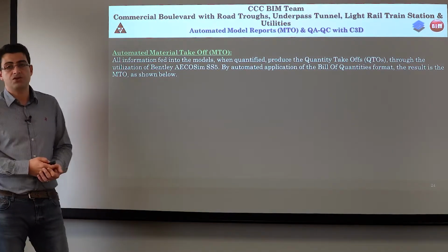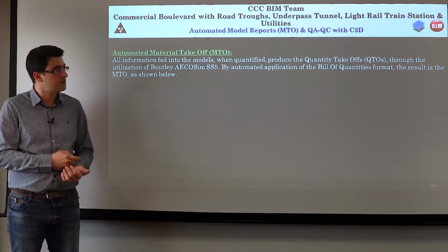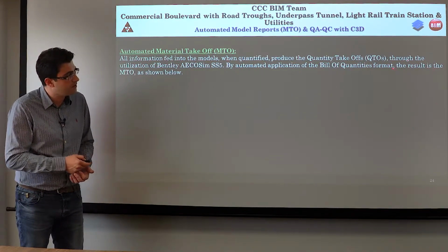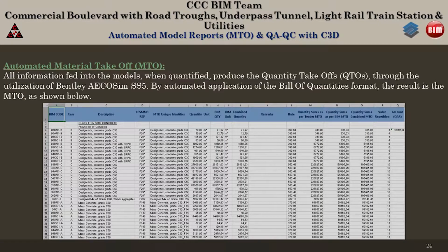In an automated application which was in-house developed, these quantity takeoffs deliver the bill of quantities, which is the result, as you can see here, additionally from the model that fed the database that we had to develop in order to satisfy the client's requirements.